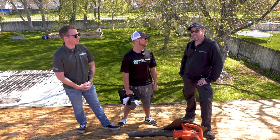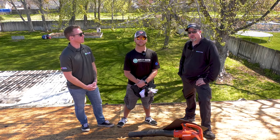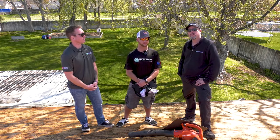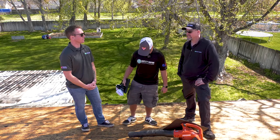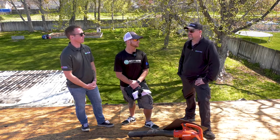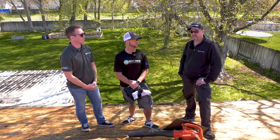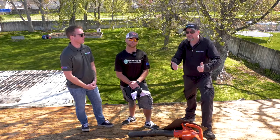Correct. And if you didn't know that you had skip sheathing, as a project manager, you have failed your homeowner. You should have known skip sheathing was up there when you did your attic inspection before the job got approved. If you're just finding out you have skip sheathing, oh, wow. You are way behind the eight ball, and now you've got a lot of work ahead of you. You're going to need to get solid pictures of it, and you're going to need to have a really long conversation with your homeowner and your adjuster.